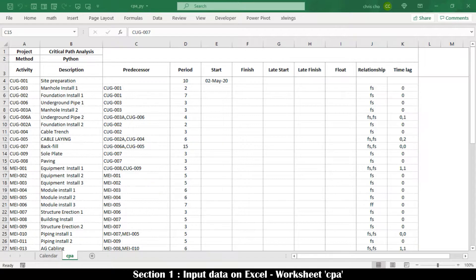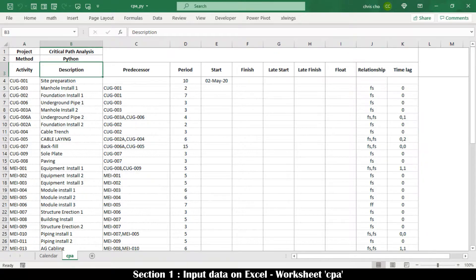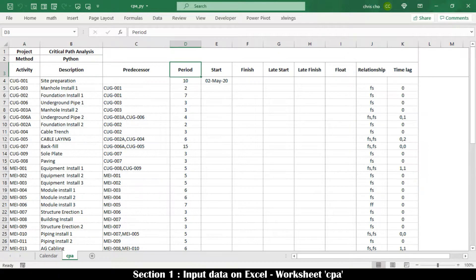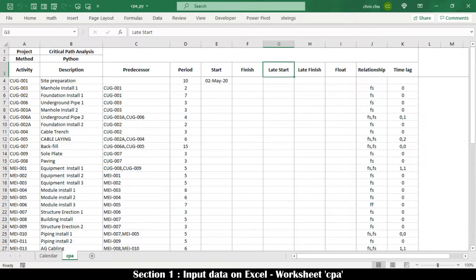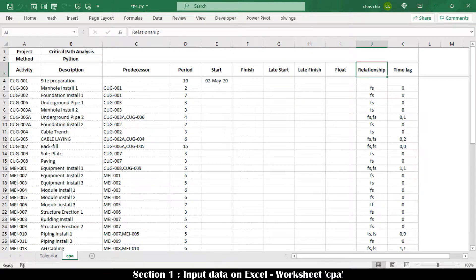Eleven columns A to K are used on the CPA worksheet, with headings in row 3. The columns are: Activity, Description, Predecessor, Period, Start, Finish, Late Start, Late Finish, Float, Relationship, and Time Lag.